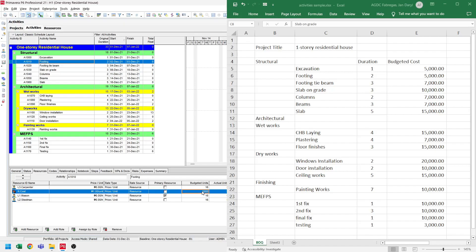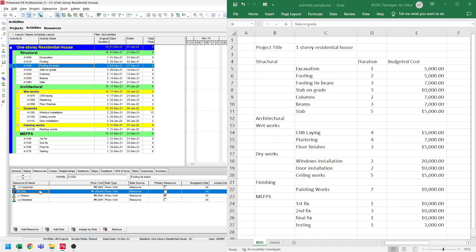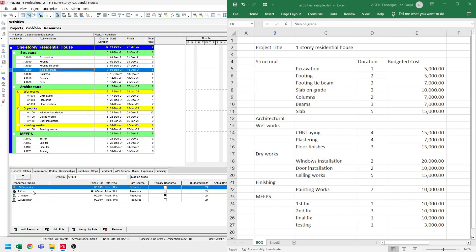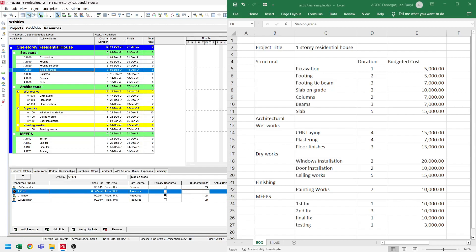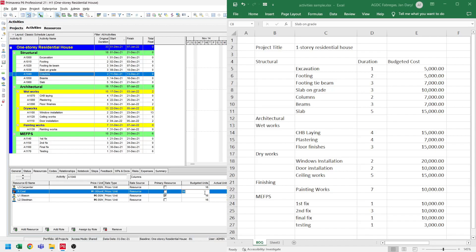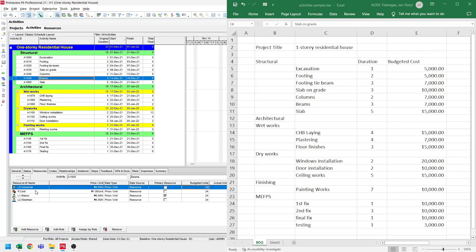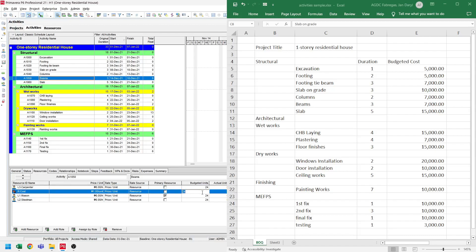For the footing tie beam, we have $7,000. So we click the footing tie beam activity, select the cost, and set the budgeted units to $7,000. For the slab on grade, we have $10,000 cost on our BOQ. So we select the slab on grade, select the cost, and set the budgeted units to $10,000. For the columns, we have $7,000, so let's select columns and set the budgeted units to $7,000. For the beams, we also have $7,000, so we select the beams and set the budgeted units to $7,000.